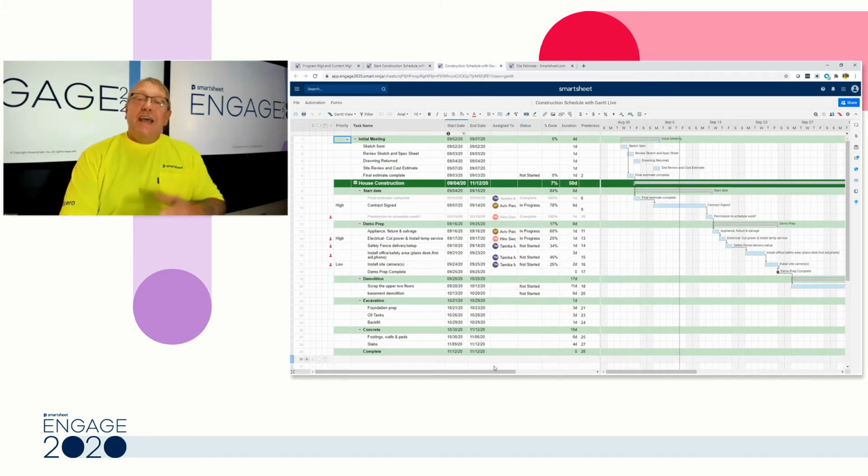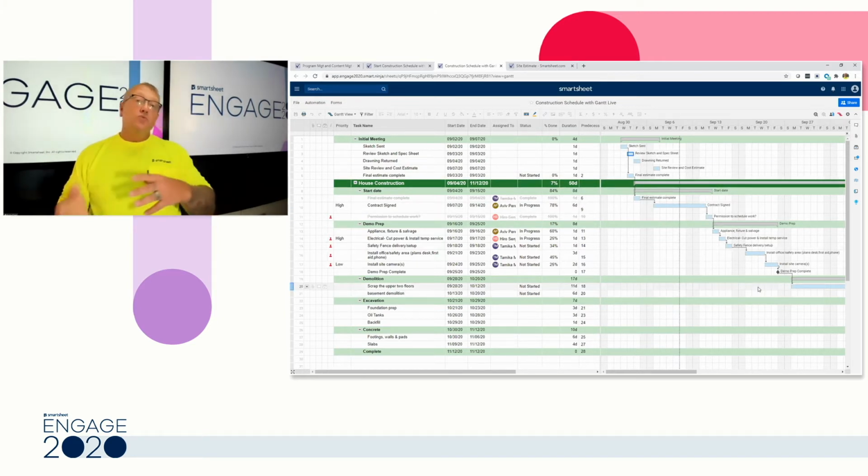Here we go. You'll see on this project sheet, looks the same, but I've added end dates. And by adding end dates, I can now see the full breadth of how long each task will take. And I can also see what is dependent upon other things. And you see in the predecessor, you can add that by putting in a number of the row that it's dependent upon, or you can grab it like this and actually connect those two. You can connect that, make those connections. Sometimes I'll do one, sometimes I'll do the other. It depends on how I'm building things.